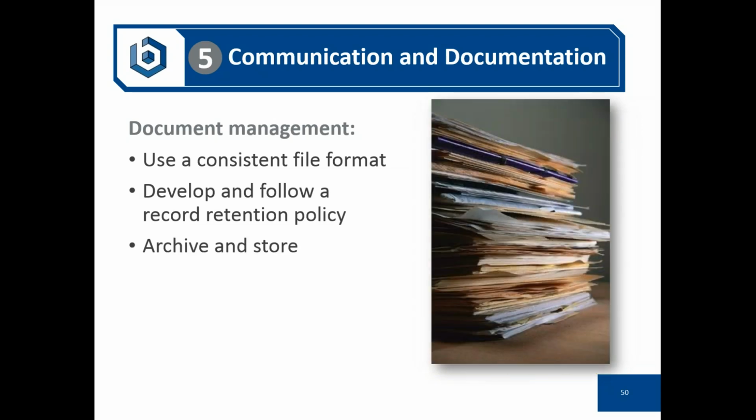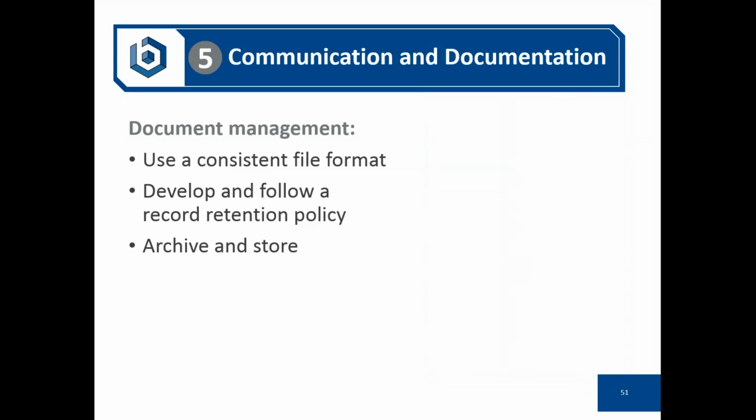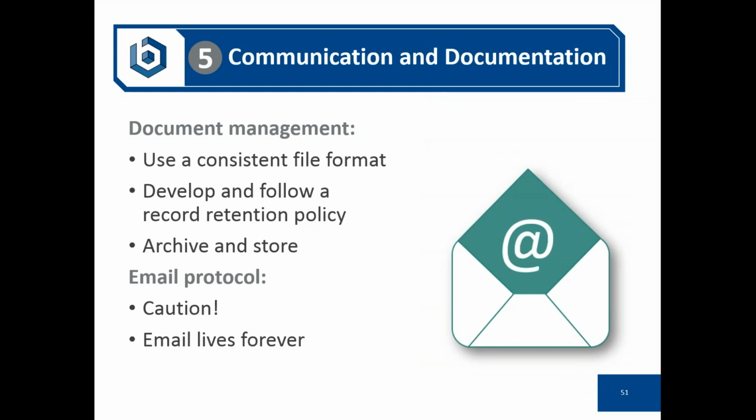Archive and store them. Have the discipline to consolidate paper files at the end of the construction documents phase, at the end of the project itself, and at the end of final completion. Align your electronic filing systems with the paper files that you have. Most firms are moving towards 100% electronic, and make sure that it's all consistent.